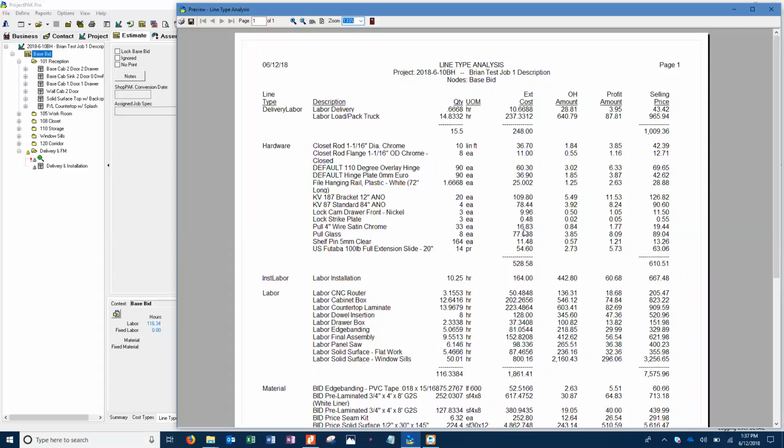But you could certainly take 1944 and divide it by 33 to find out what it is. Now, if you know the price of your new one is 25 bucks, you could take 25 times 33 and tell them the difference. And you could make a change order with one line item, new pulls, and this is the new cost. That's the fastest way. That's how I do it now.